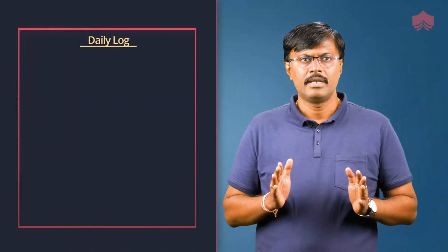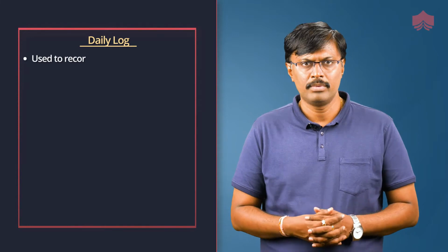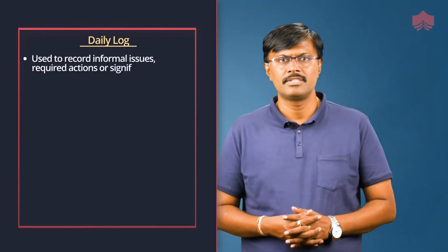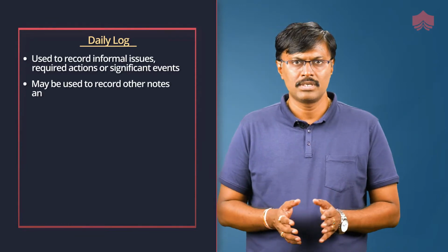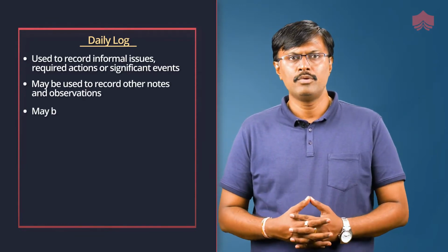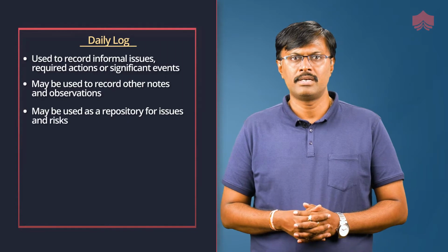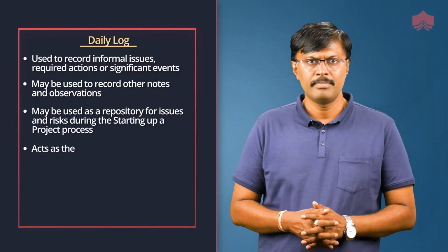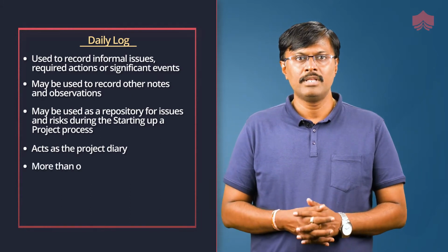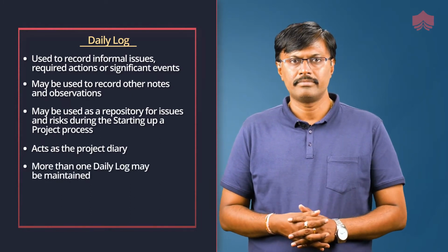Daily log. Daily logs are used to record informal issues and required actions for significant events. They may be used to record other notes and observations, and may be used as a repository for issues and risks during the starting up a project process. It acts as the project diary. More than one daily log can be maintained.